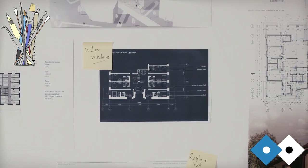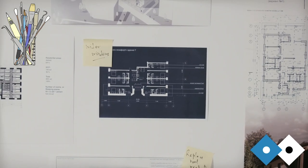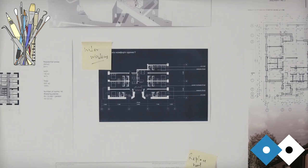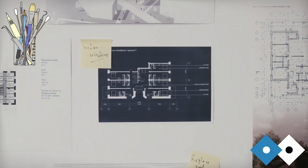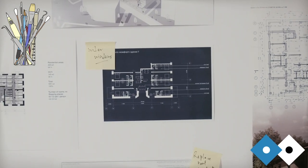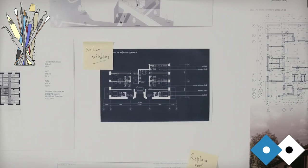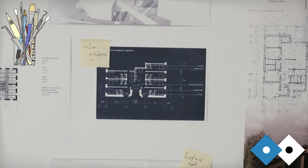Yes, what we eventually did was we managed to get to a point where Zenzi was happy to give us an envelope of cost, if you like. I hate that word, but so that we knew roughly what we were aiming at trying to raise. And she worked with the images and video and interpretations that I sent her to create some kind of estimate. And then we just had to contract her and send the stuff over to her, and she properly saw it for the first time when she got it. And that is obviously a very great risk.